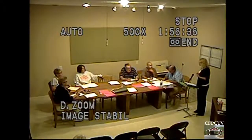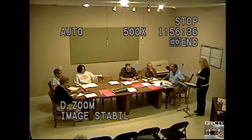Today, they also did some base repair. We had a couple places on Main Street and on Washington Street when the asphalt truck was here that the base gave way. So they did some base repair in a couple places today, and that wound up being an extra cost. But it was something that we needed to do in order to stabilize the street base before we do the paving and the wedge.